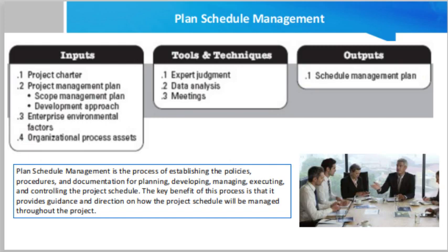Control thresholds. Variance thresholds for monitoring schedule performance may be specified to indicate an agreed amount of variation to be allowed before some action needs to be taken. Thresholds are typically expressed as percentage deviations from the parameters established in the baseline plan.